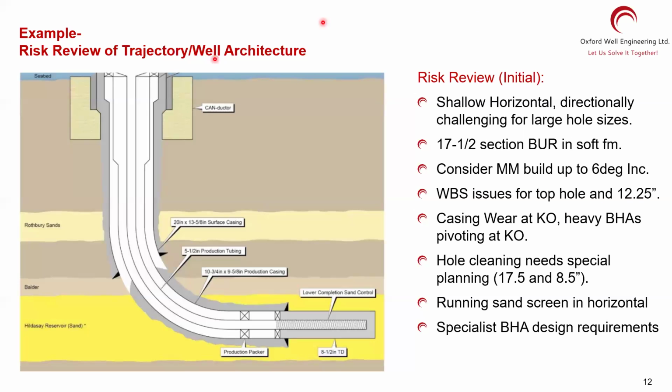So this is just a picture: if you see a well, you draw the well trajectory, you go from top to bottom, and you look for the things that could be a problem that you need to incorporate in your directional well plan. This kind of risk review is an estimated number, the very first pass you do. Then you start to go about simulation.